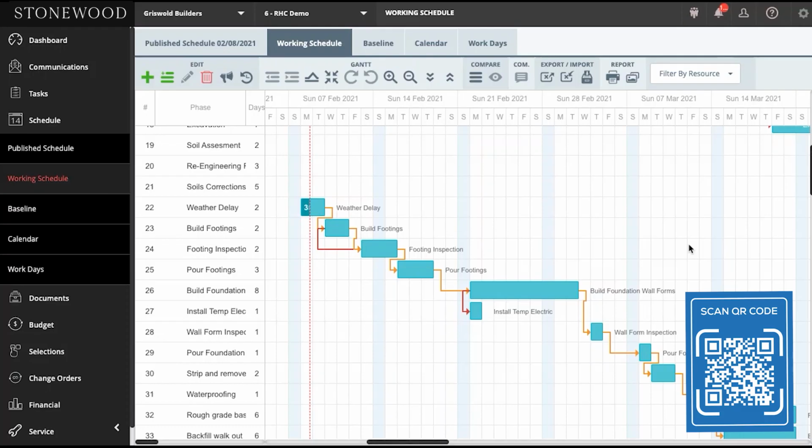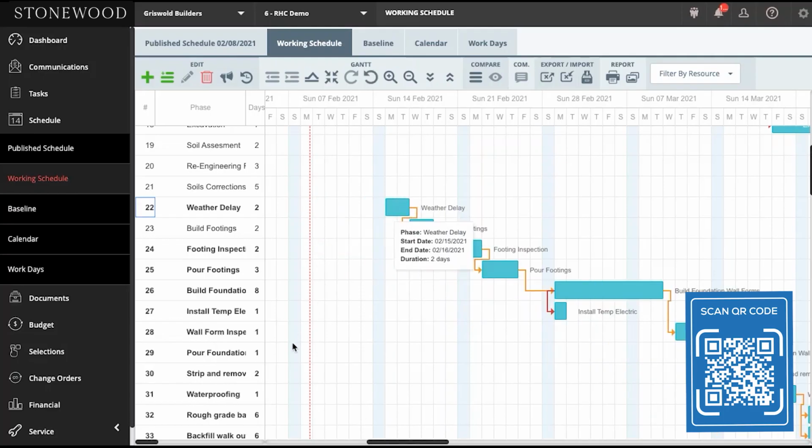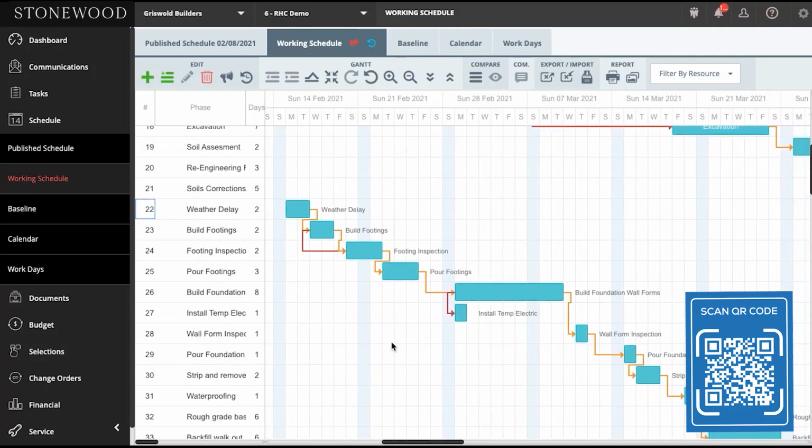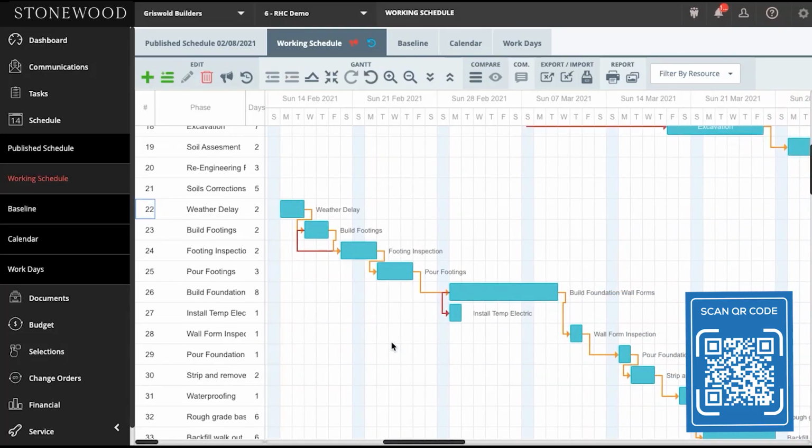We can then have a nice clean view to see how phases are working towards one another, but when we run into any type of project update, delay, or need to make a schedule change, it becomes very easy for us to just shift one tile, one phase, and have everything connected automatically updated. Now that'll update automatically in your view within BuildTools so we can see how those changes reflect. However, it does not automatically update our trades.